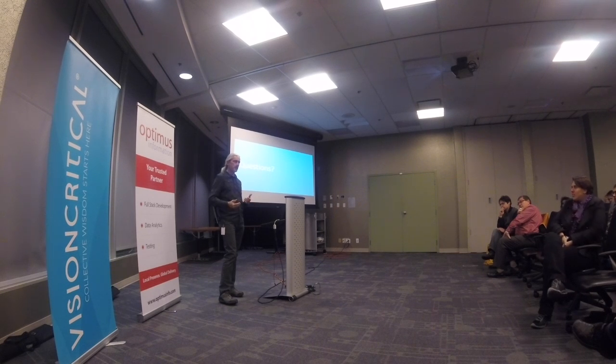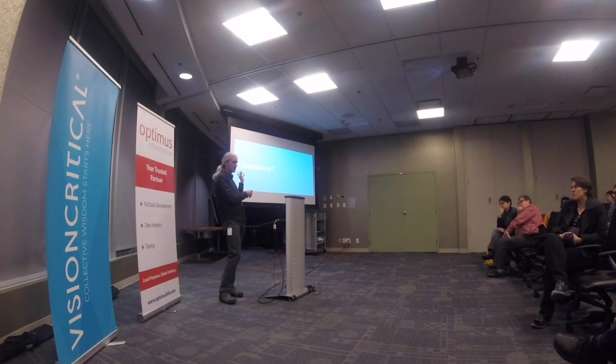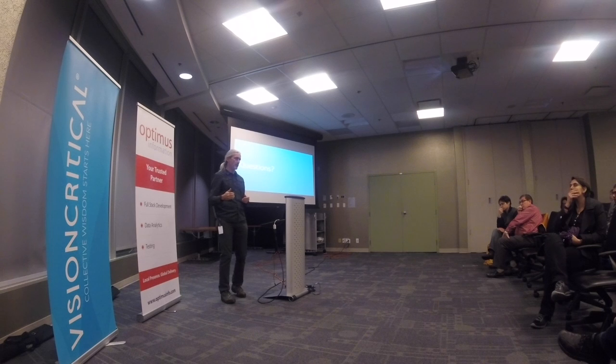So the other thing you need to do is say, I'm creating artifacts along the way that act as somewhat of a documentation of how I come to some of those things. So you've identified a bunch of risks. Maybe you've got a whiteboard diagram with some colors and notes on it that you've stored in your card or whatever it is you're using. And then you've got a series of tests that you come up with to say, I want these tests covered, and then you've got some results against those tests to say, I did these things and I didn't do those things because I didn't get to them. And then you ship it to the customer, and the customer reports a bug. Then what you have to do is go backwards along that chain and say, okay, this customer bug occurred in this area. Now, how do I understand where that bug got introduced?